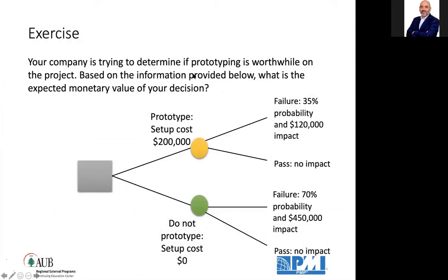Exercise. Your company is trying to determine if prototyping is worthwhile on the project. The prototype costs $200,000, but if we prototype, the chances of failure will drop a lot, from 70% to 35%. Based on the information provided, what is the expected value of your decision? Shall you prototype or not to prototype? This is the question. Go ahead.